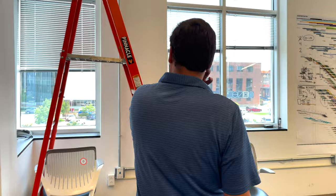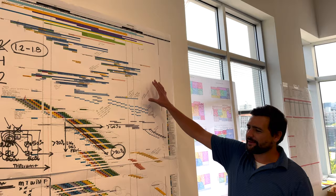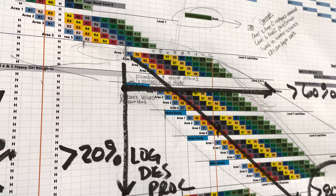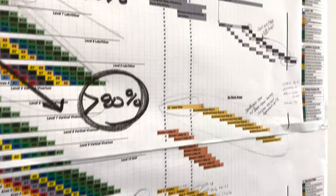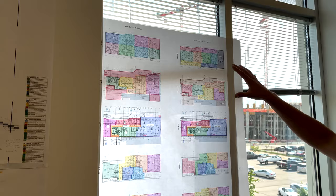You're about to see Josh's masterpiece — we drew on it today so ignore the drawings, we were doing a little lesson. This is our takt plan for the entire job on one single page, which is what we pull into the work plans. It helps us plan the work for all the trades and see everything on one page to poke holes in what we have going on.